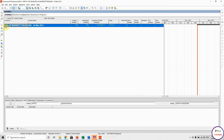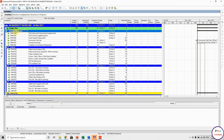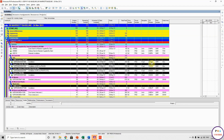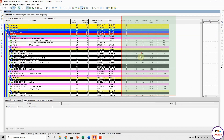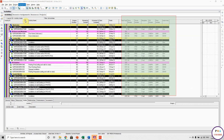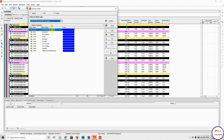This is the one I need. Let me show you the construction. As you can see here, Primavera shows the activity code value — it doesn't show the description. This is very important. For example, this one: D09. If nobody knows what this is, I have to go here to see the description — what is the description of this code. I need to show the description in Power BI, not the code value.